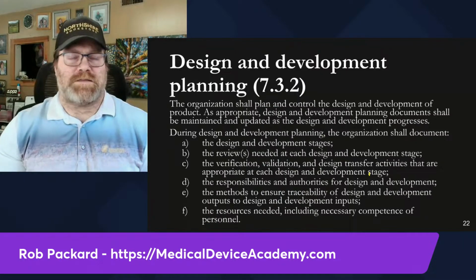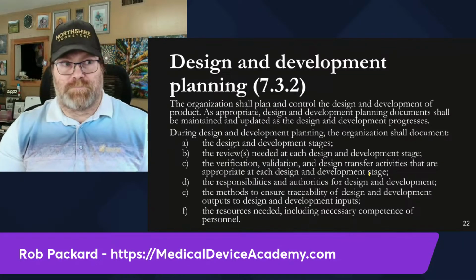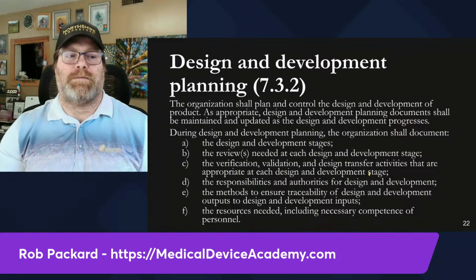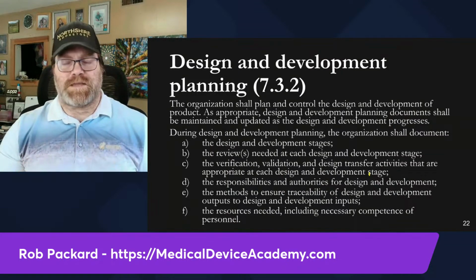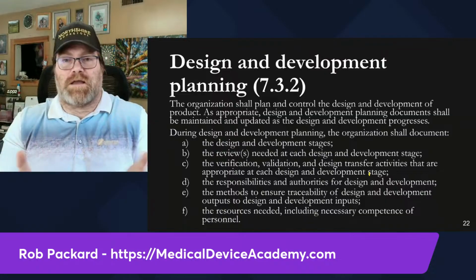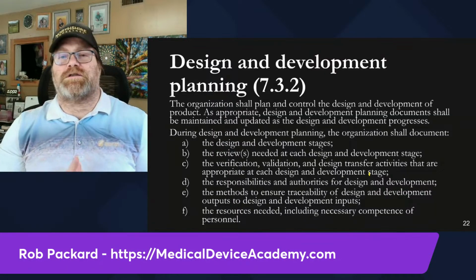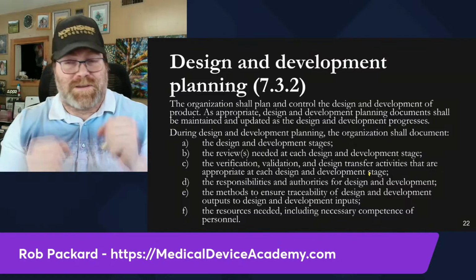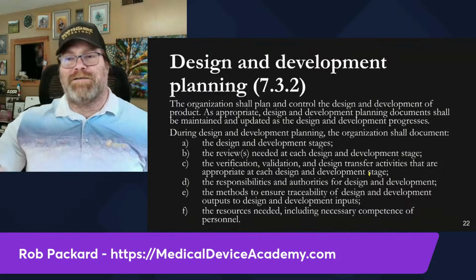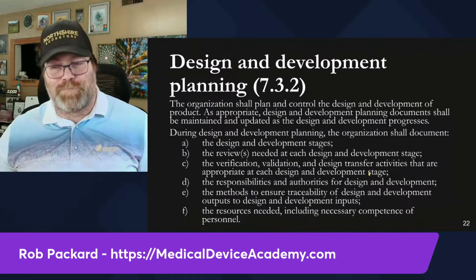The next clause in 13485, or sub clause, is design and development planning. You have to plan your efforts. So a lot of people say to me, no, I ask this question all the time. Do you have a design plan? Have you started your DHF? And the answer is no, but I'm ready to submit a 510K. Like, wrong. That's absolutely wrong. The 510K is at the end of the process.